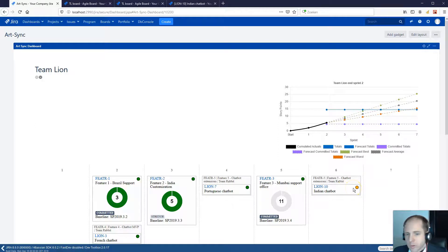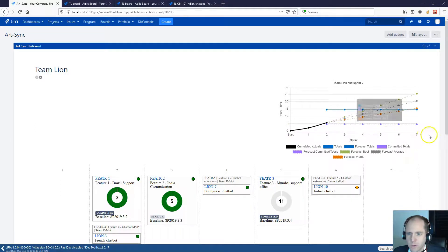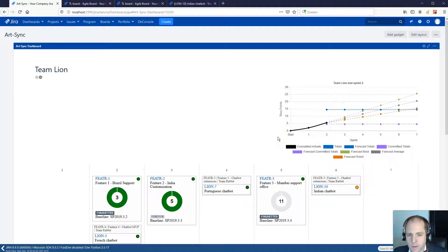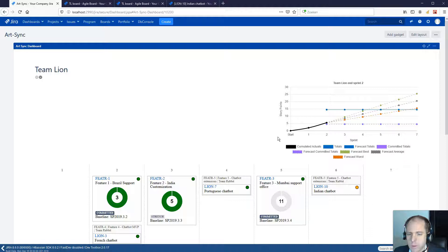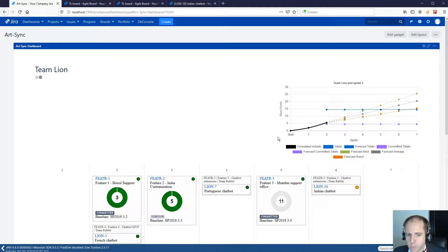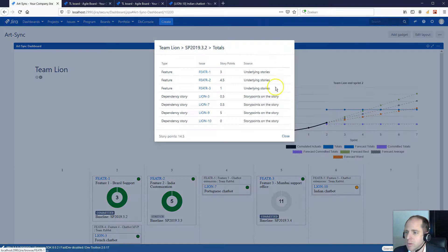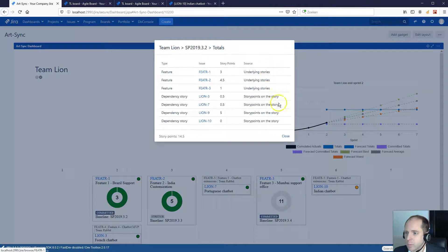The progress of a team is visible in a graph with the sprints horizontally and the story points vertically. The black line contains cumulative completed stories from the team and the blue line is a total of story points scheduled in that period. You can click on a point and see how it is composed.